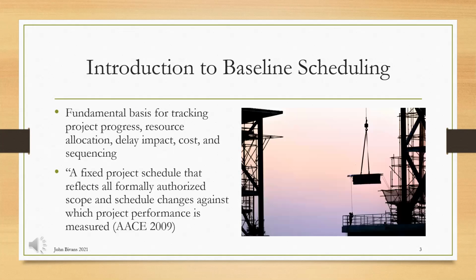In today's construction industry, a baseline schedule provides a fundamental basis for tracking project progress, resource allocation, delay impact, cost allocation, and project sequencing. As such, the Association for the Advancement of Cost Engineering defines a baseline schedule as a fixed project schedule that reflects all formally authorized scope and schedule changes against which project performance is measured.